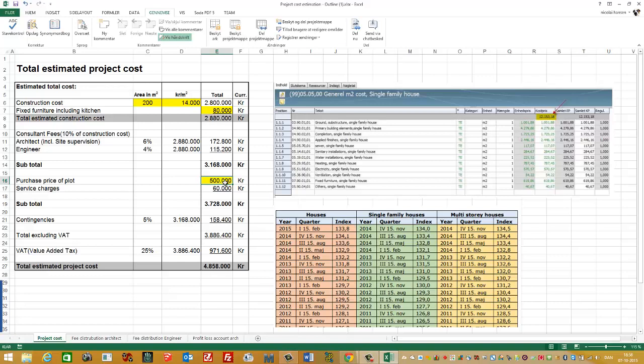Then I need to add the price for the plots and the service charges. The service charges could be the district heating and the sewer system, the electrical system. All this gives me a new subtotal of 3.728 million Kroner.